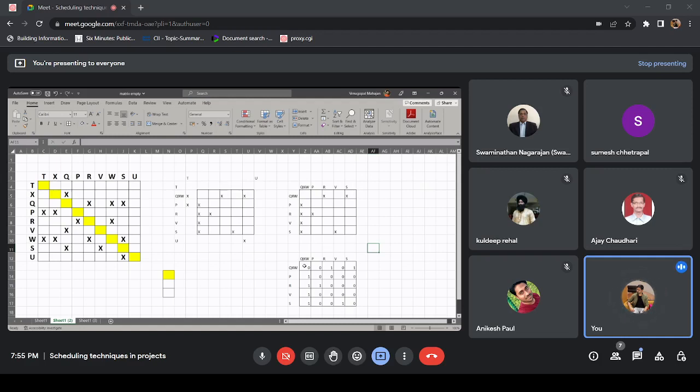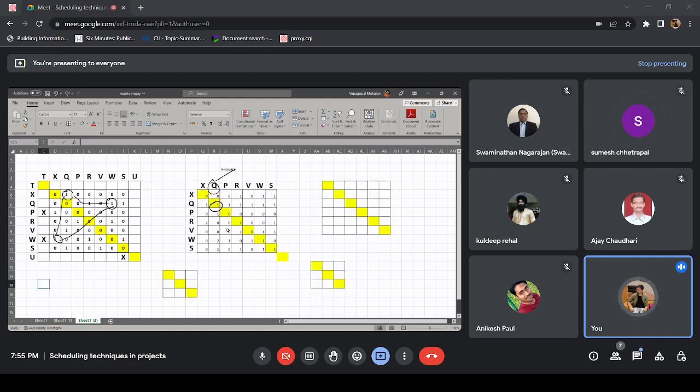Okay. See, this was the multiplication that we got, right? This was the matrix multiplication, the second one. Can you see it on the screen? Yes. So if you see, you have got 1 here, but for the remaining X and W, you are not sure. With W you are getting it, with X it's still 0. So this actually only gives us the starting point. And from that starting point, we have to go back to our active block and look for the loop.